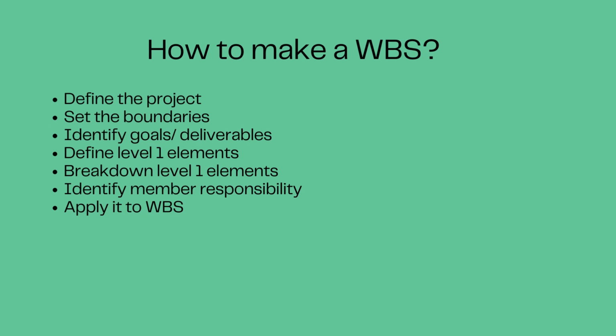How to make a WBS. Define the project, set the boundaries, identify goals and deliverables, define level 1 elements, break down level 1 elements, identify member responsibility, and apply it to the work breakdown structure.